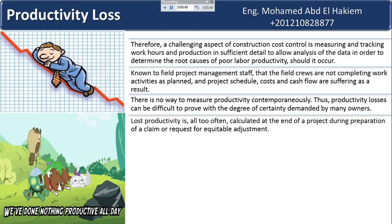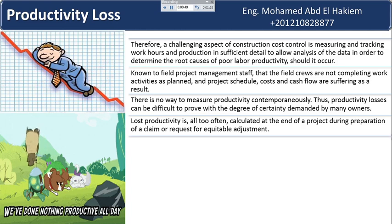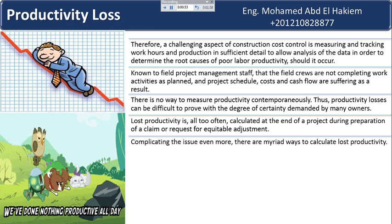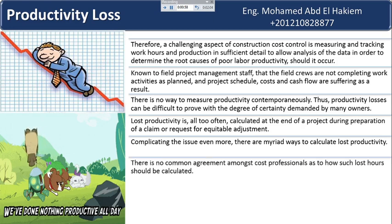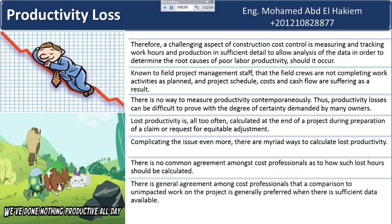Lost productivity is, all too often, calculated at the end of a project during preparation of a claim or request for equitable adjustment. Complicating the issue even more, there are myriad ways to calculate lost productivity. There is no common agreement amongst cost professionals as to how such lost hours should be calculated, though there is general agreement that a comparison to unimpacted work on the project is generally preferred when there is sufficient data available.